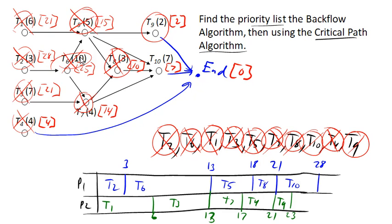In fact, you'll even notice here that this row across the top is exactly our critical path. And so we get those tasks done as soon as possible.